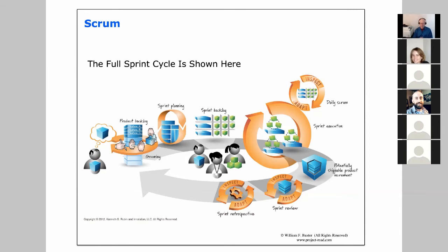And going a little bit deeper, it's an accountability check-in, because really what you're saying is, what did I commit to doing yesterday, and did I live up to that commitment? And if not, then we've got a conversation there. And then what am I committing to do today, and what impediments do I see? Well, let's talk about those proactively so we don't have to have this conversation again tomorrow. If you have some impediments, let's try to solve those.